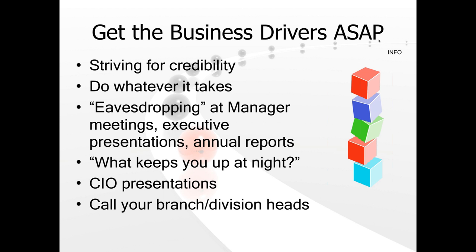Our experience at client sites confirmed that incremental successive phases of 3 to 6 months in duration were powerful tools in keeping people motivated and dedicated to the cause. So, although enterprise architecture is about continuous realignment with business goals, each phase of the process has to be treated as a project with an end in sight. So, taking small steps and creating short-term wins is an important part of the winning strategy.